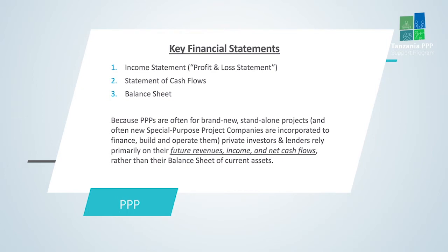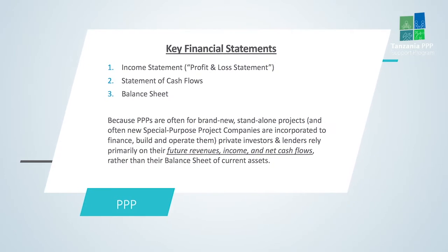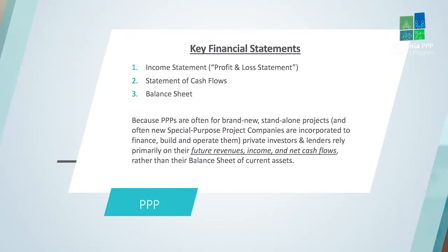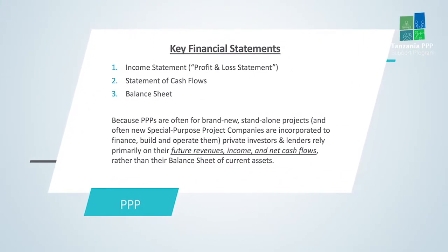You saw a couple of times yesterday I showed you the waterfall model of cash flows, how cash flows through a project. First you start out with the revenue, next you pay the operating costs, then you pay the debt service, then you pay your taxes on income, and then you pay your profits. So these first 2 statements though, are different depictions of a flow concept. Slight differences in them, which we'll talk about.